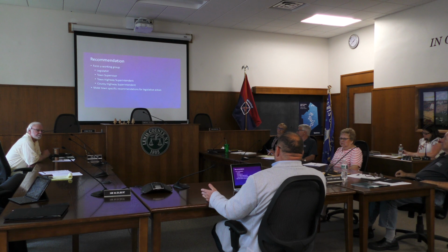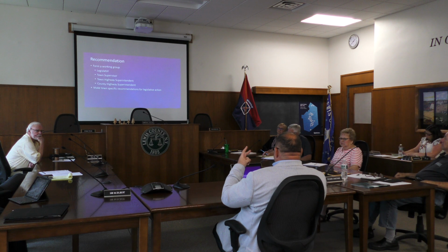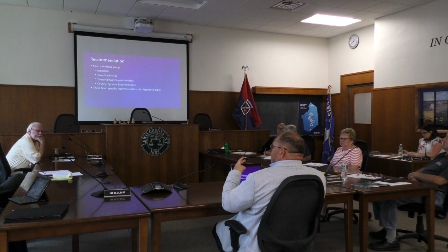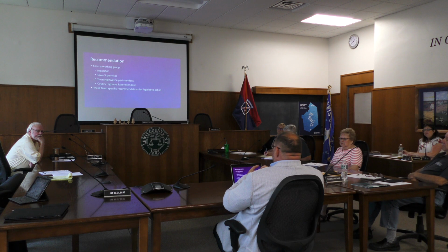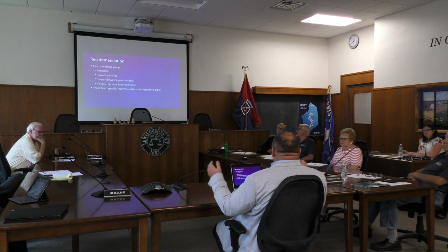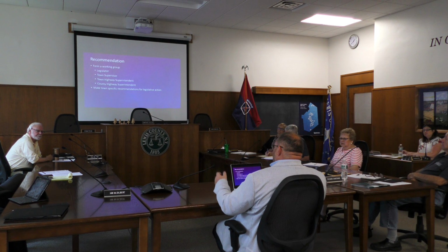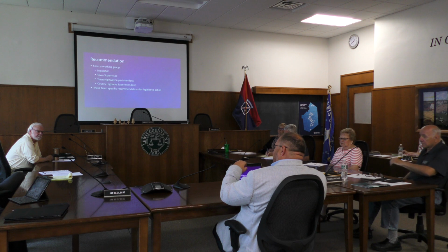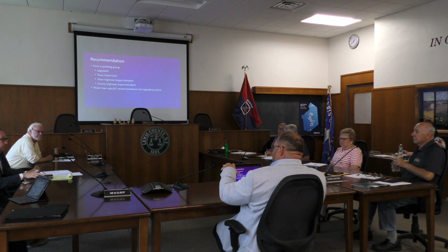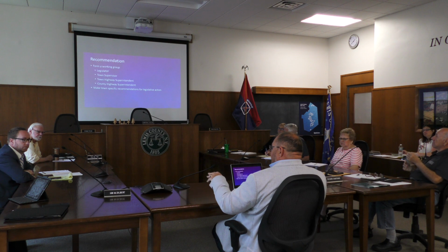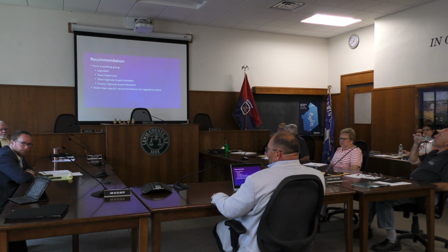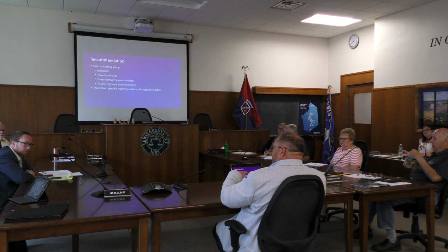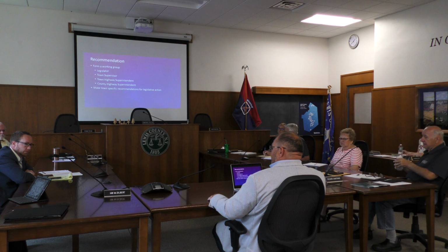So one of the things that I've been doing, the state, when they inspect them, they give flags, and a flag is bad, you gotta go fix that right away. They also give you a bunch of notes called non-structural condition observations, just little things that they don't like. And a lot of those are drainage issues, where water is starting to scour behind the bridge. So our bridge crew has the little mini excavator, they have a mowing head, a ditching and digging bucket, and a compactor plate, and we just send them right out there as soon as I get those reports, and we fix that drainage problem, get that water away from the bridge, fix the back wing walls, mow out any brush that's growing up through the structure, and try to get ahead of it is what we've been trying to do.